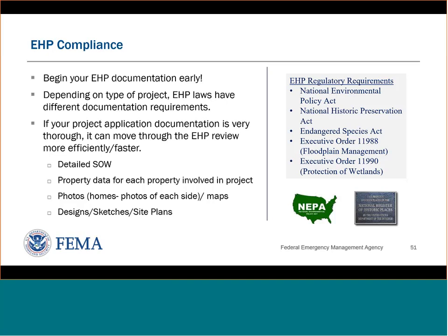One key data point that I will suggest that you always include in your property data is the year the structure was built, or the age of the structure, because the age of the structure is what's used to determine whether there may need to be additional historic preservation review involved. So if you just include those right up front, you won't have to be asked for them later.